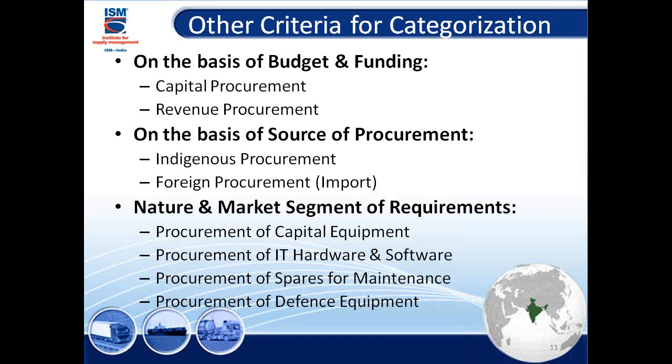While the foreign procurement means when I feel these items are not available locally at all, or even if one or two are there, but I'm not happy with their qualities around, then I advertise worldwide. I get the foreign procurements, people who are abroad from X and Y countries, and we try to compare the prices, and the best bidder gets a contract. That's how it is there. Now, when we talk of foreign procurement, then there's a payment involved around. I'm sure you already know the letter of credit, LOC part around, those payment approaches come up.